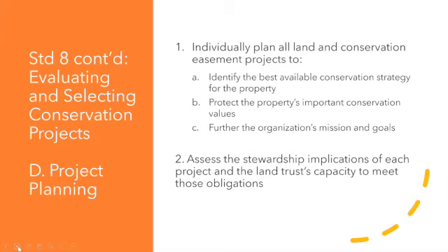And then on the flip side, looking at a fee property, prospective stewardship costs could be low for an easy to monitor, forever wild property bounded by state forest and requiring no ongoing management with no public access planned, or they could be very high for a property with a house being renovated as a wildlife education and research center, right?